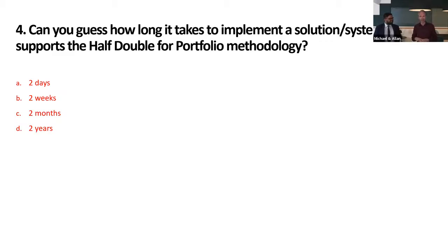2 weeks later, when we met again, those 2 projects were still stuck. No one worked on them because there were no people assigned to them. So you get to the same point, whether you prioritize or not: projects are not being done if you just put them into the system and no one is actually working on them. So I think it is interesting that some of the organizations who run portfolio management today, by not making those active decisions, just leave it to the rest of the organization to make those decisions. And of course, the system here helps us to be on top of those decisions as a portfolio board.